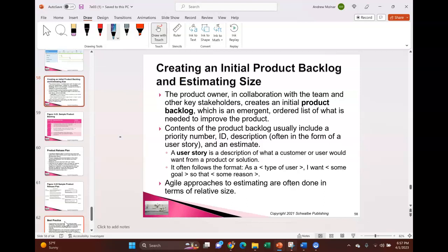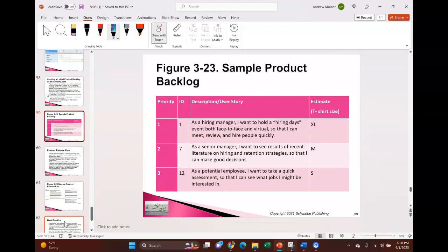And so you'll come up with requirements, and those requirements you build become the product backlog, okay, that you develop. And then you'll prioritize that product backlog, and you'll pull several of, we call them stories, you'll pull those into a sprint, okay? You'll pull from the backlog into a sprint, whatever you can do in the time period allotted. So here's a sample product backlog, right? And these are really stories. These are called, notice, user stories. You've developed user stories. These are very narrow but important pieces of value that you want to develop in your software.